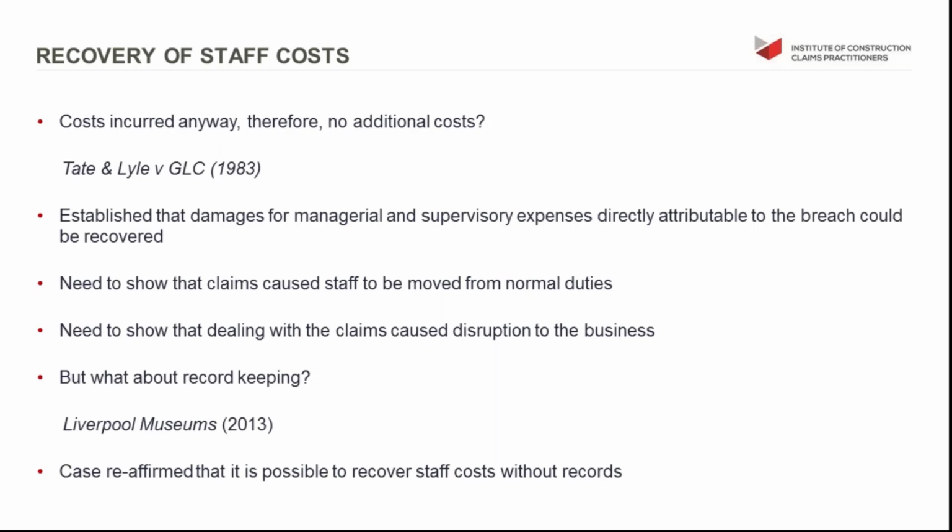And I think that just emphasizes something that as claims professionals, we're all very well aware of: the importance of record keeping and what it's needed for. Tate and Lyle gives us a classic example of where the failure to keep records backfired on the contractor and stopped him being able to pursue his claim for claim preparation costs, despite the judge concluding that it was perfectly acceptable.